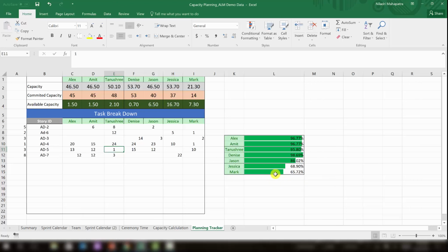So don't pick a story that you think you will only be able to partially complete. If a story is not completed 100% in a potentially deployable state, then don't do it.